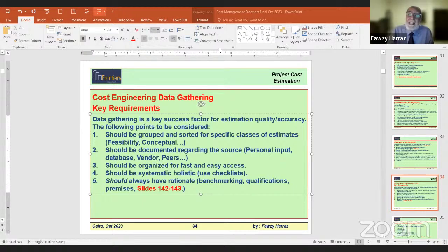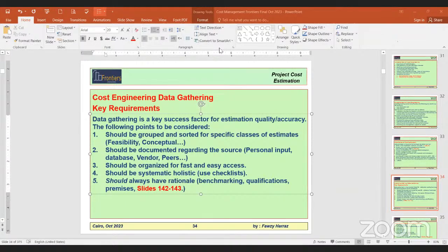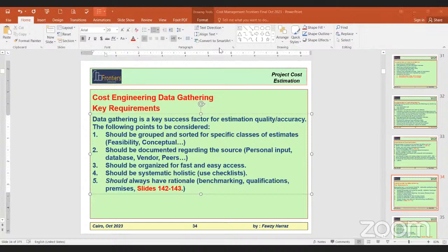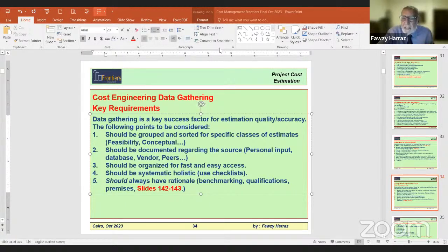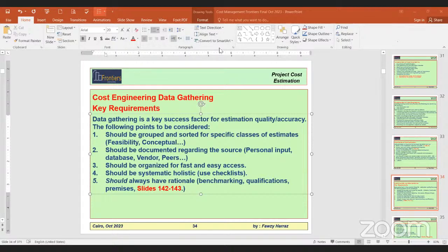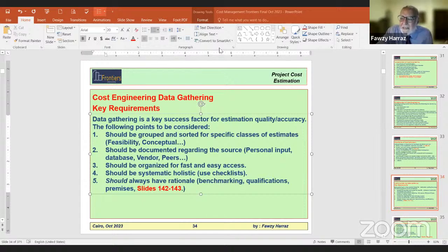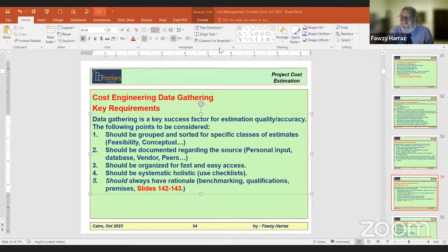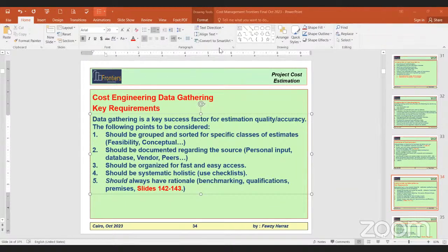There is bid cartelling. The bidders colluded. They talk to each other and say, you will offer 1,500 million, I will offer 1,700 million, and the third will offer 1,800 million. If your estimate is 1 billion, you can expect quotations to come at 1,100,000,000, 1,200,000,000, something like that, which is 25% accuracy. Your estimate can be inaccurate within this 25%, but it cannot be inaccurate to 50%. You are an estimator. You cannot make such a big gap. In this case, you can, in confidence, go to the management and say there is bid cartelling. The bidders colluded against the company.